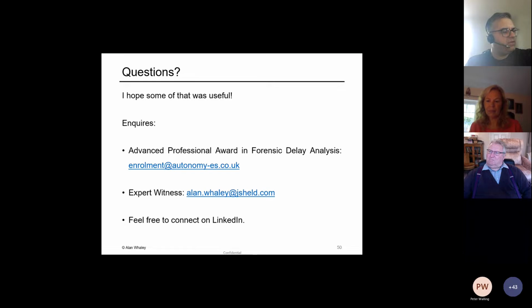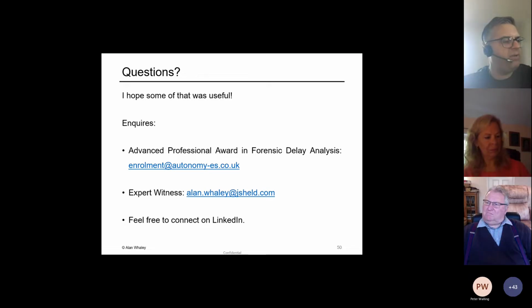JCT is very different, because although a JCT in theory can be worked like an NEC, it very rarely is, because the project or contracts administrator is not mandated to do so. And the JCT actually requires the contracts administrator at the end of the project to itself perform a retrospective delay analysis, even for events that haven't been notified by the contractor. So JCT tends to be, frankly, where many of the disputes occur, and also most suited to a retrospective delay analysis. So the difference really is in the philosophy of the contracts administration.